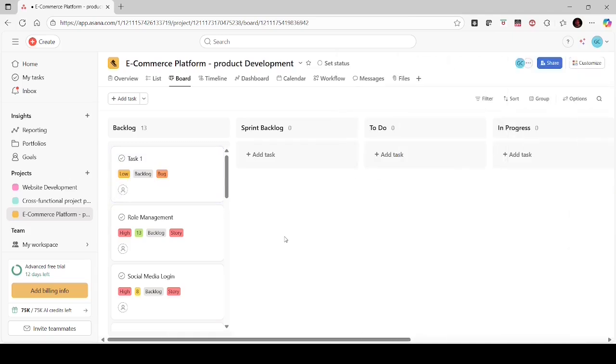Now during the backlog grooming session, we shall have to identify which stories we can pick up for the next sprints. Based on that, we shall do the estimation, and if any clarification is required, we can do it and update the story or item appropriately, so that we spend less time during the sprint planning meeting.